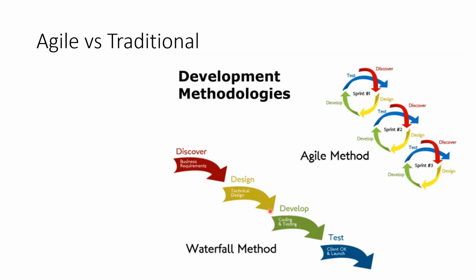High level design is done by your architects and designers, user interface designer, UX designer, whoever it is, right? And then once the design is frozen and signed off by the customer, you move to implementation, where you do the low level design and coding and testing, right? Coding and unit testing. Once you implement that and get a sign off from the customer, then you move to the testing phase. That's a sequential approach, called the waterfall method.